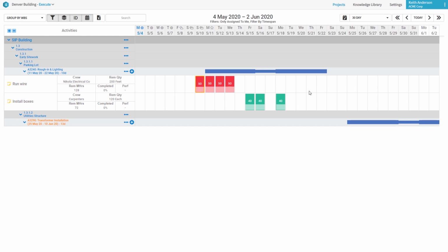So whether these tasks are starting ahead of the CPM or get pushed beyond the CPM date, then we show that as a breach. So this is a very important communication, not only to the planner, the interval planner, but to the scheduler and the broader project team to show how the work phase plans are being planned in relation to the overarching plan.